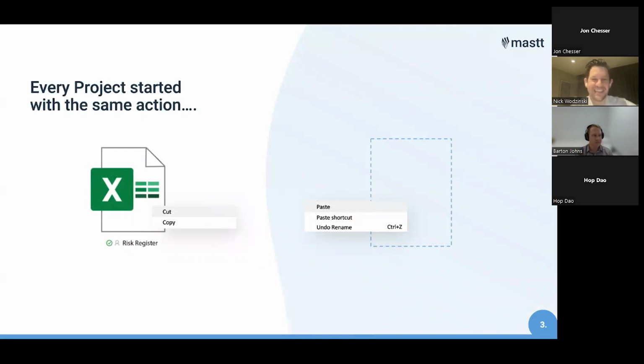basically something like, okay, the new project's kicking off. It's maybe in design or inception stage, and it's time to start managing our risks. So what do we do? We go get the old risk register from the last project that we worked on as a PM, and we use that as our starting point, the old copy paste. And so that was a really interesting learning. It showed that people are trying to have consistency between their projects, and that they also want to have a starting point to be able to do risk management.